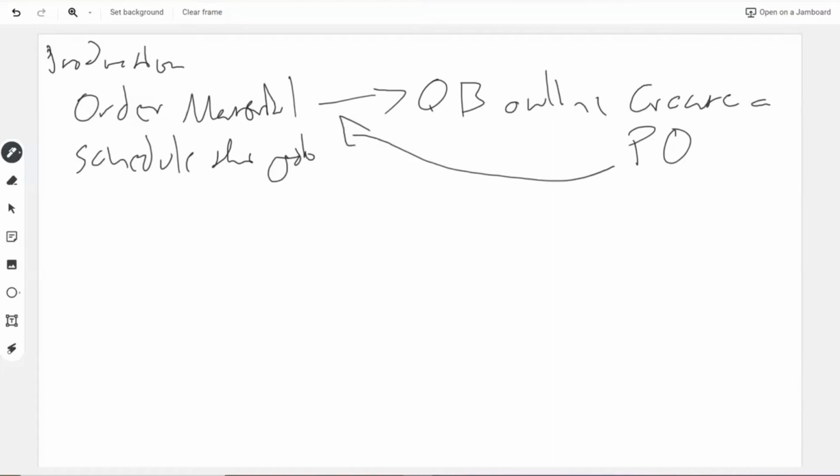By using that purchase order for any of the job expenses, it automatically lets us know that it's associated with that job, which makes it easier down the road when I'm trying to make sure we capture all expenses for a job. We have that PO. Now we build the job, and the day the material gets dropped, our supplier invoices us, so we get a material invoice